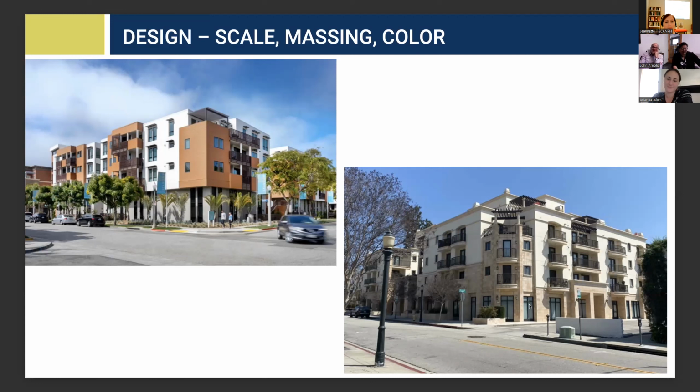I think the most successful times we have are with early processes. Long Beach has a really good process of meeting early with all the departments. LA has one, but it's more optional. Long Beach pretty much requires it, with case management, and they turn things around pretty quickly and have good commentary. So I think just making sure that everyone who needs to see it sees it early and gets their comments in.